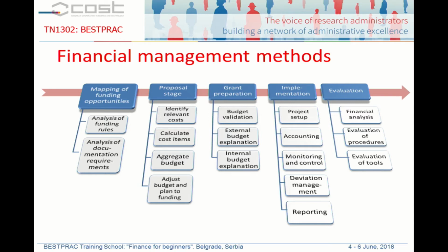And if this is a new kind of program for your organization, what you need to know is that you can probably not just use your normal calculations as they have been in the past and then submit on that basis. You have to study the rules of Horizon 2020 and then create new calculations for that purpose when you produce the budget.